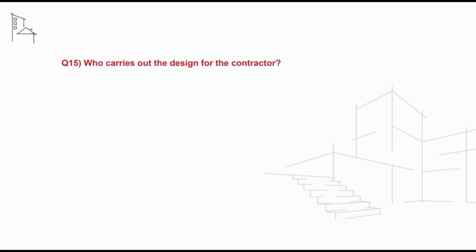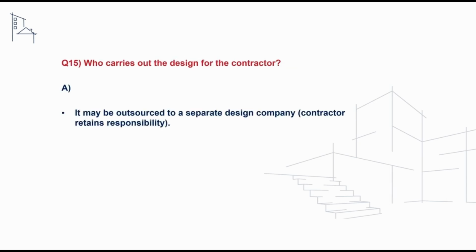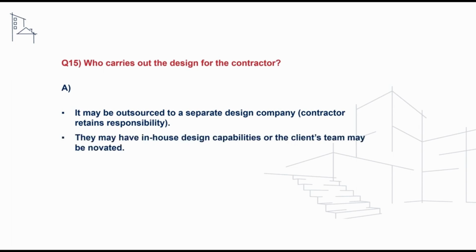The next question we'll take a look at is who carries out the design for the contractor. And to address this, we can say that it may be outsourced to a separate design company where the contractor retains design responsibility. The main contractor may also have in-house design capabilities, or the client's design team may be novated across to the main contractor.